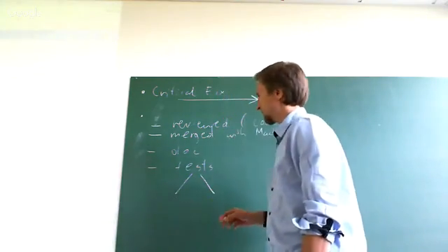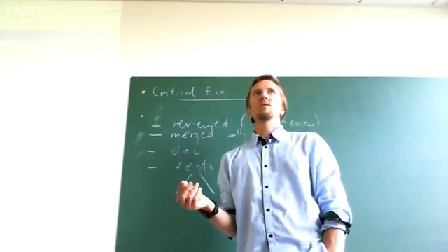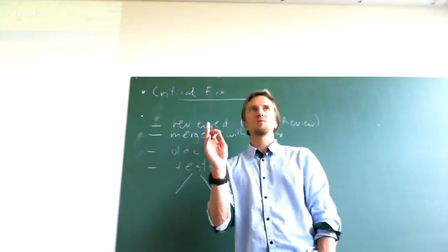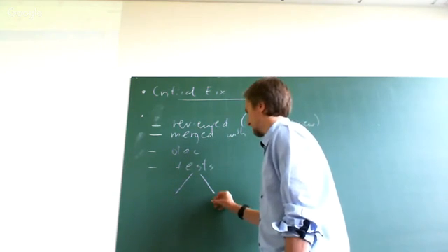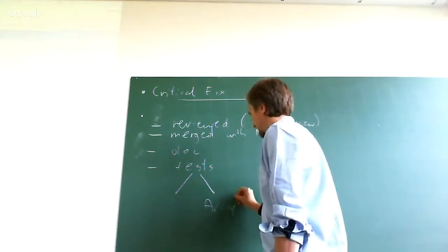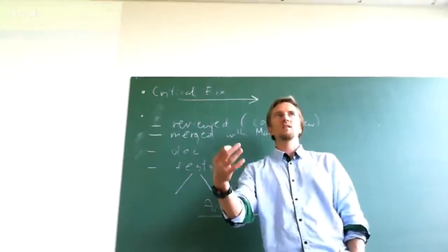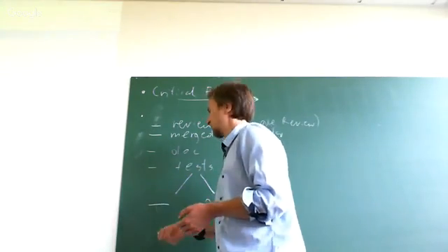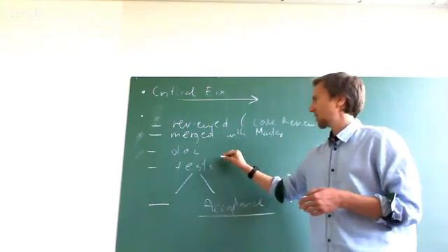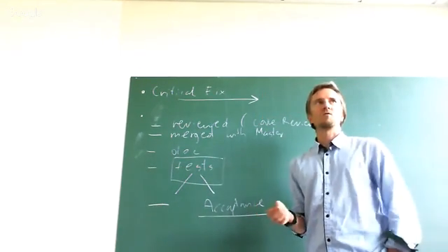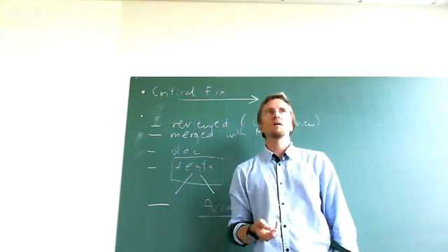Okay, so here we're kind of splitting hairs on the tests, right? So what you're saying is that if something has been agreed with the product owner and the product owner says, yes, I consider it to be done, then you would consider it done. So the official term is acceptance tests. You test whether the product owner accepts what you have. And then you have all your developer tests like unit tests or regression tests and so on here, right? So the tests are a little bit more complicated. So you can have a part of the definition of done that it has actually been accepted by the product owner.